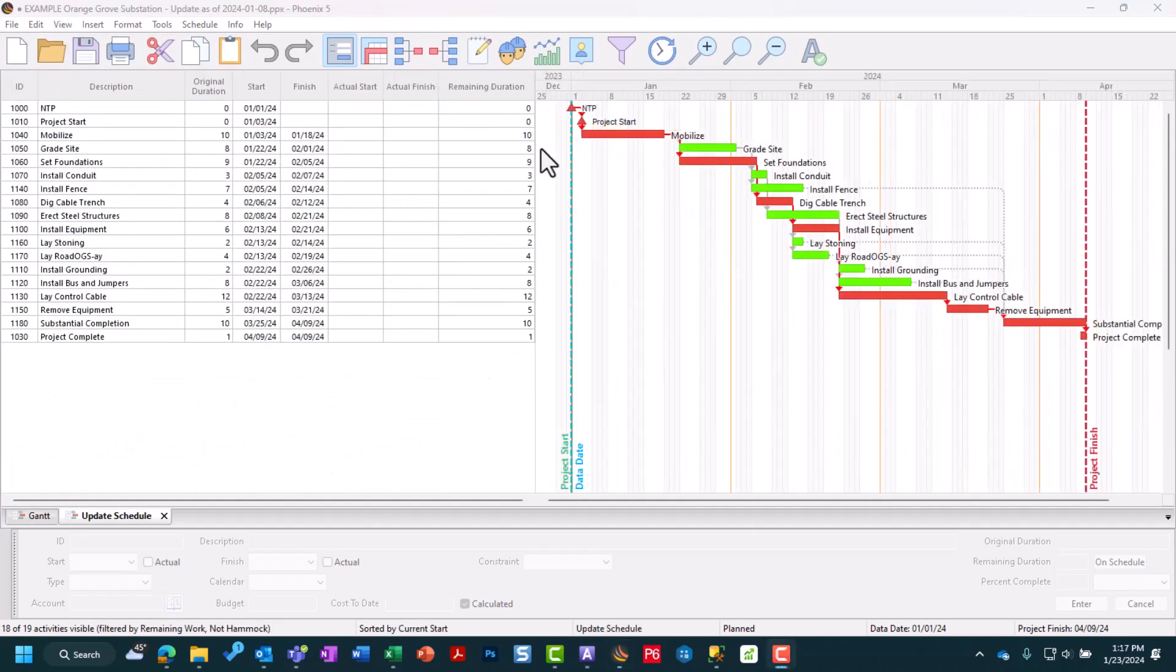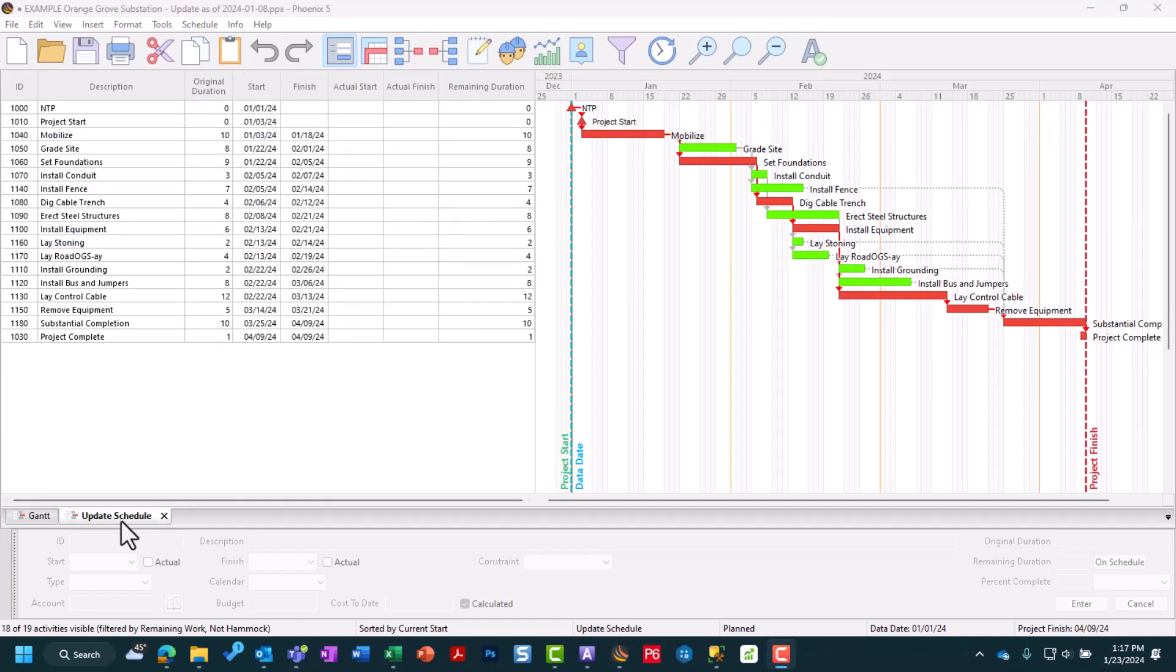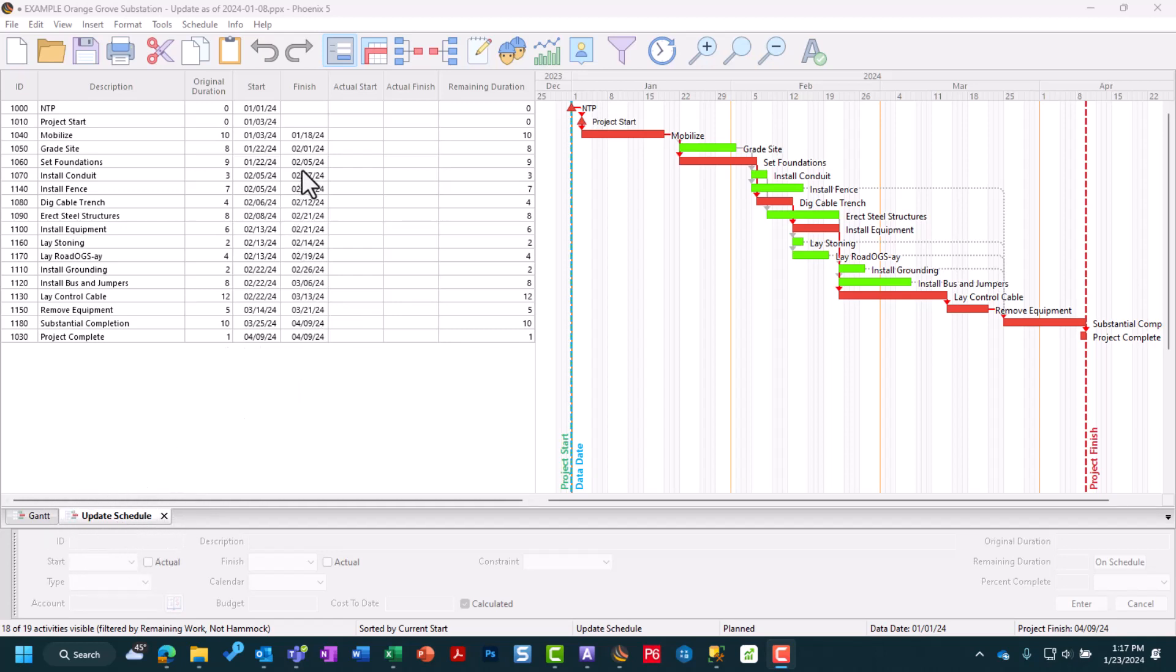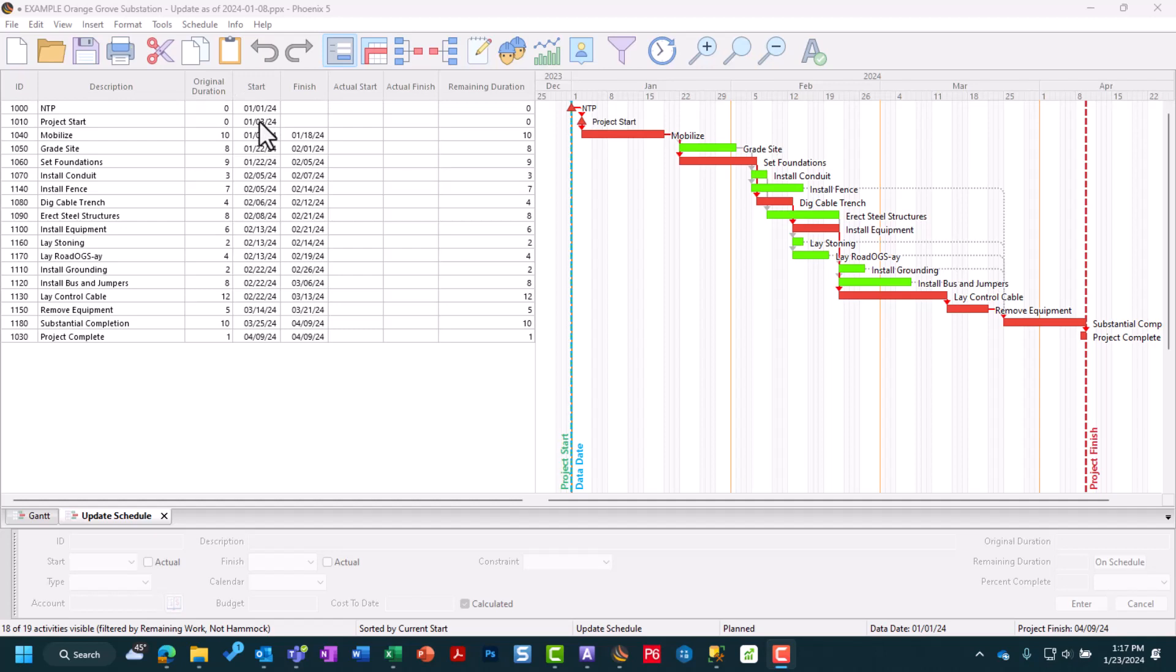The next thing you should do when updating your schedule is to have a view or layout set up specifically for updating your project. The one I have here has no codes active, it's currently sorted ascending based on start date, and I've also filtered out all completed activities and hammock activities, because I don't need to update those.